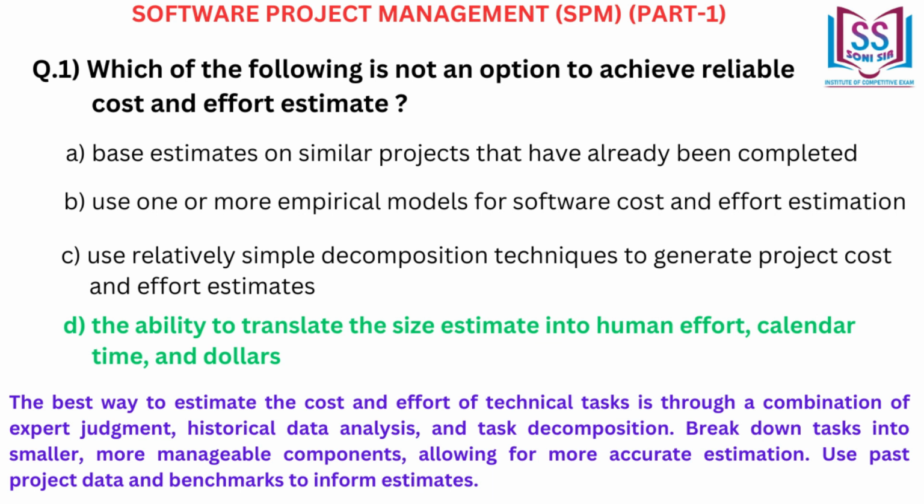The best way to estimate the cost and effort of technical tasks is through a combination of expert judgment, historical data analysis, and task decomposition. Break down tasks into smaller, more manageable components, allowing for more accurate estimation. Use past project data and benchmarks to inform estimates.